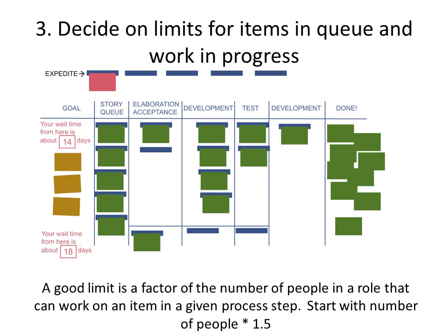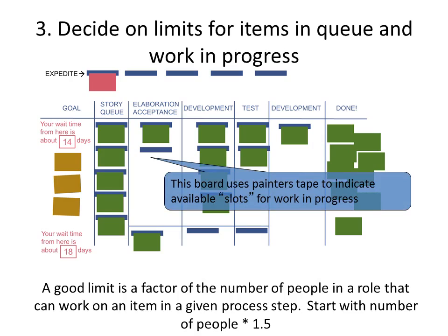Now, work in progress limit per lane is an important concept in Kanban, and each lane has a certain ideal limit set for the work in progress. So, for example, let's say in one of these lanes, you do not want more than 2 items to be worked on at the same time, and in that case this shows like an empty slot.